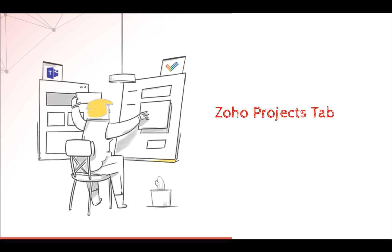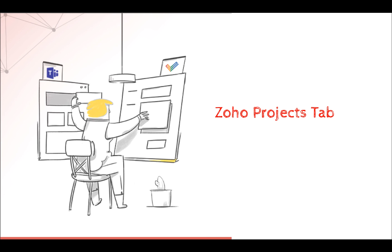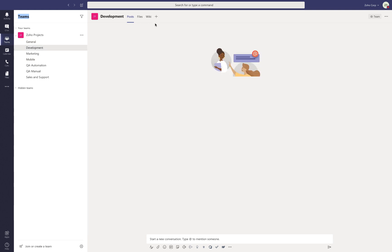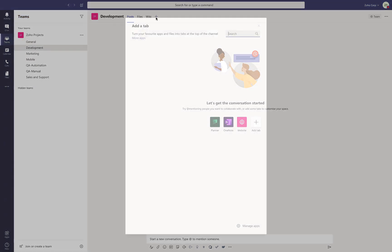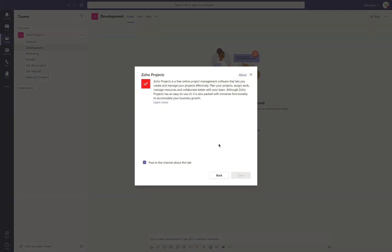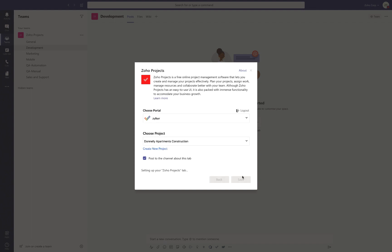Zoho Projects Tab. Your Projects module can be added as a tab to your channel. To do this, select the channel that you want to add this to, click on the plus icon at the top, select Zoho Projects, then select the portal and the project that you want to add and click on Save. Your Projects module will now appear on MS Teams, giving you complete control over the module.